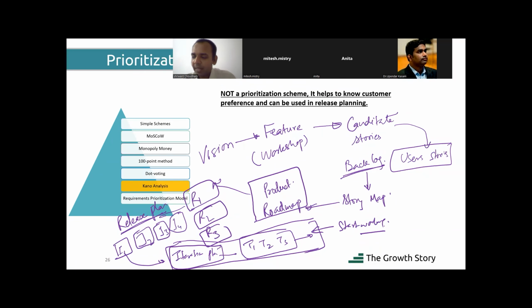So with release planning we will be able to segregate or prioritize which delighters we will put. Suppose we have 5 delighters overall in the product backlog, and I have 3 releases. So I will put 2 delighters here, 2 delighters here, and 1 delighter here, suppose. Or 2, 1, 2, whatever. See, the product owner has to delight the customer at the end of the project. So how will he do it?